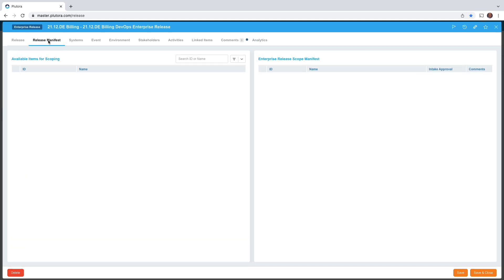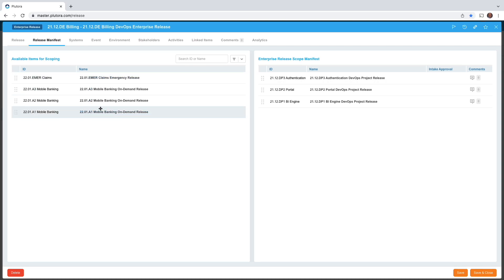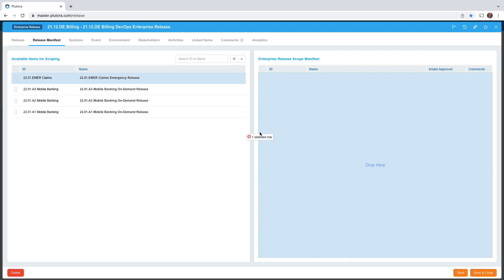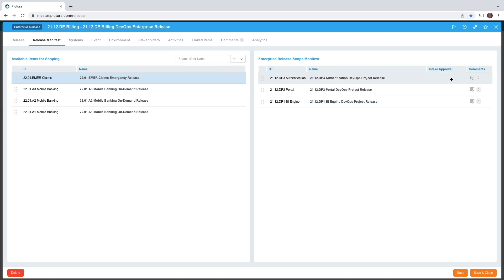But it has a new tab, the release manifest tab. On the left are the available projects for scoping and on the right are the ones that are under consideration. You can simply drag and drop from the left to right the project releases you want. Right now there are three under consideration and there's some intake approval that you can do.